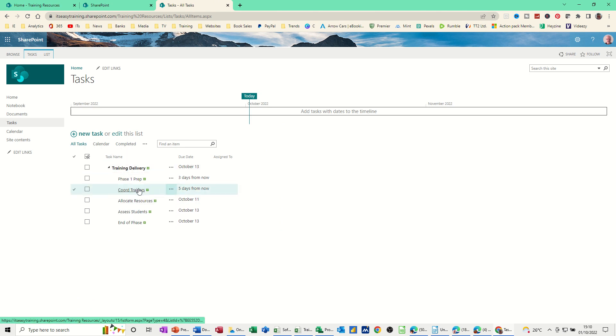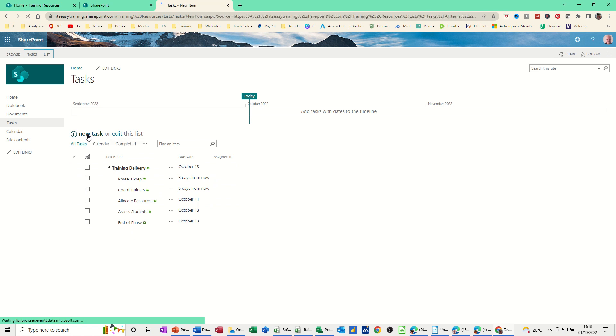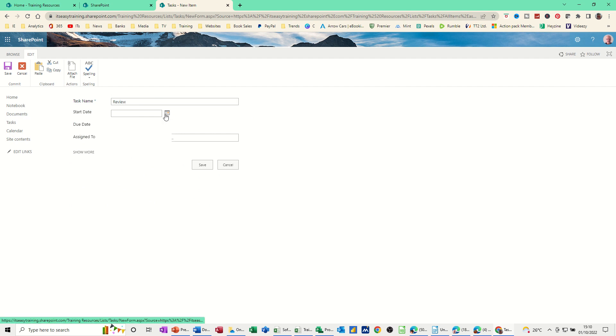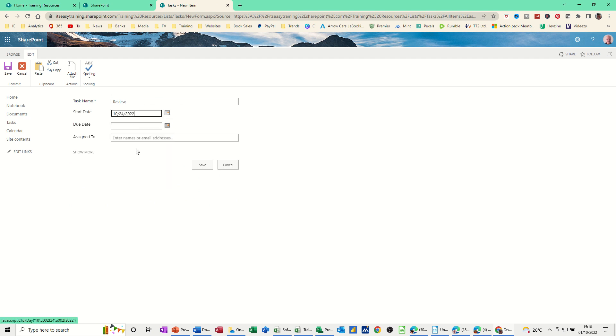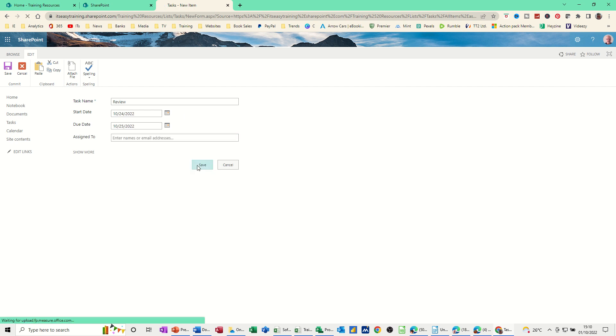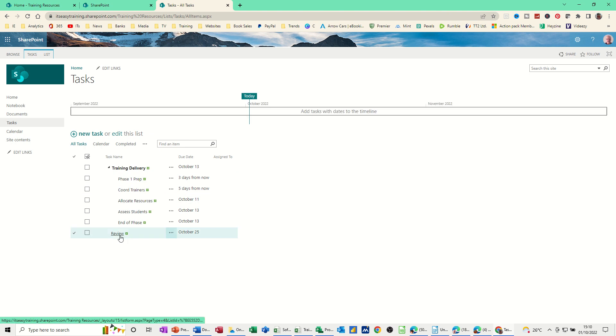Now in this view or in Project I can add a new task. So if I click on New Task Online first off and just call this Review and give it a start date of the 24th and a finish date of the 25th say and save it. That will sit down the bottom here.